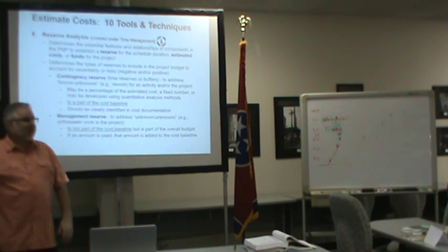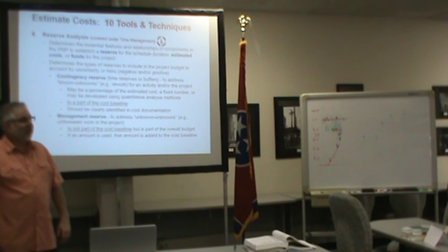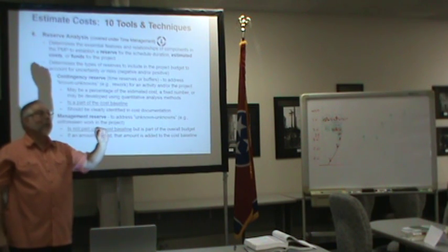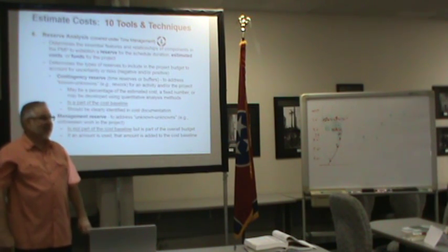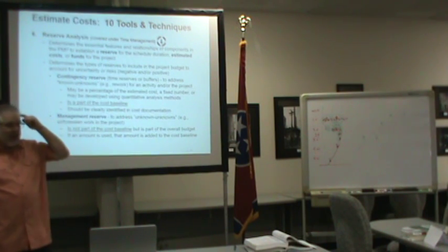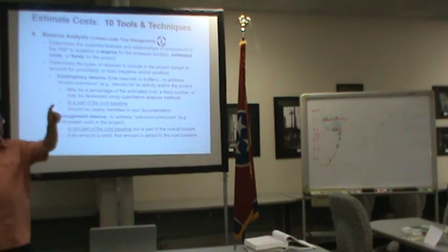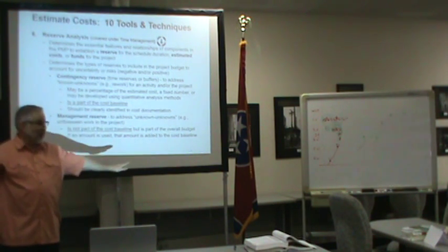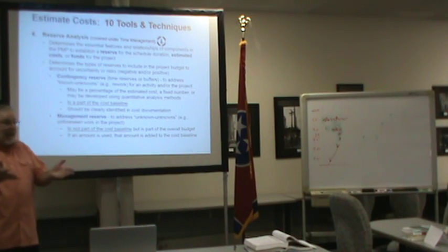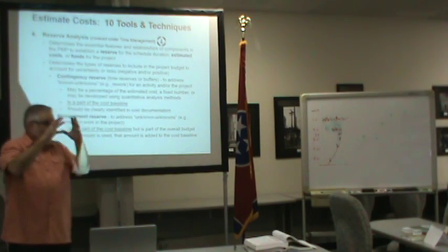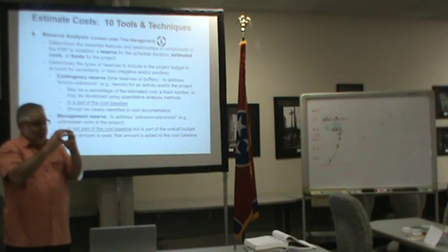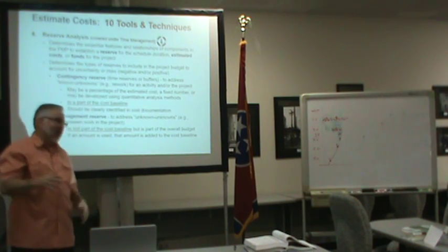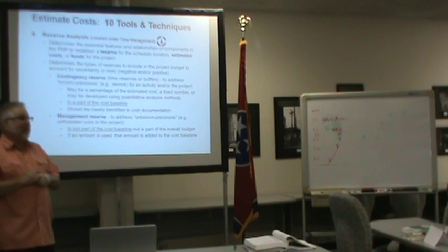But you said that contingency reserve, when you get past that known risk, it goes to the bottom line. Is that a PMI thing? Could you move it from there into management reserve? No, that's a good question too. In the PMI world, it goes back to the company. You as a project don't have control over it anymore. In the PMI world. In actually running projects, when that money becomes available, you're going to have all kinds of people saying, hey, I need that, I'm behind, I need another person, I need another piece of equipment, yada, yada, yada. So it becomes a business discussion.